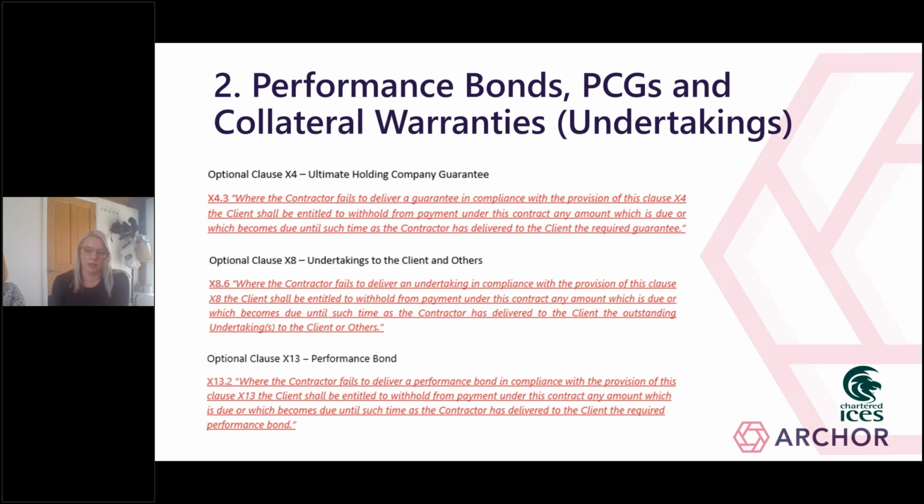So in terms of the parent company guarantee under X4, it's important to note that the standard NEC contract assumes that a PCG will be provided by the contractor's ultimate parent company, so an ultimate holding company guarantee. Whilst this makes sense from the client's perspective, because this is likely to be the company with the greatest assets, this might not be acceptable to the contractor.